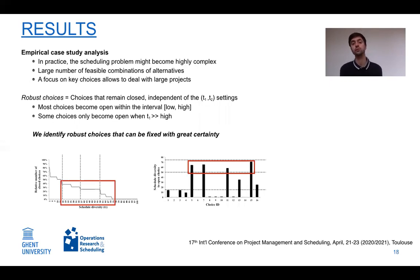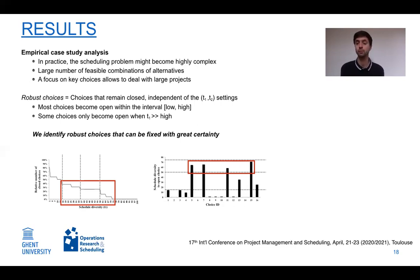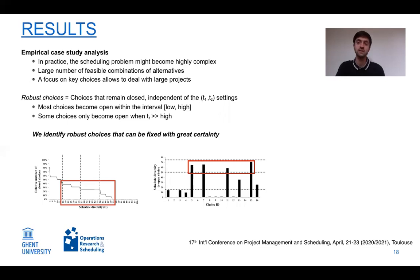We also observed robust choices — choices that remain closed independent of the settings of T1 and T2. Most choices eventually become open as schedule diversity or choice frequency increases, but some could only be forced open at very high, atypical values of T1. In other words, we could identify robust choices for which alternatives were fixed with high certainty.